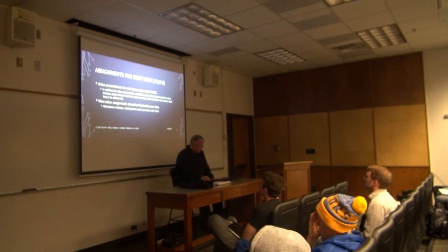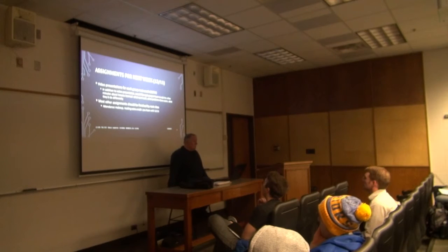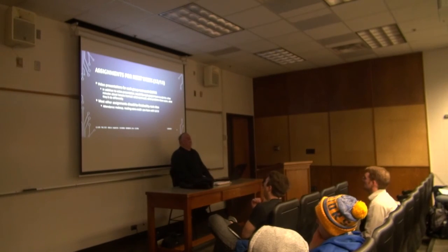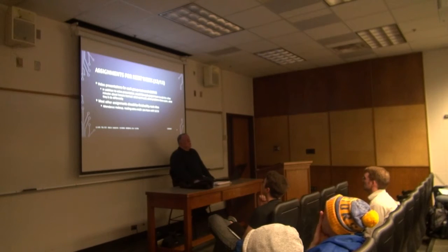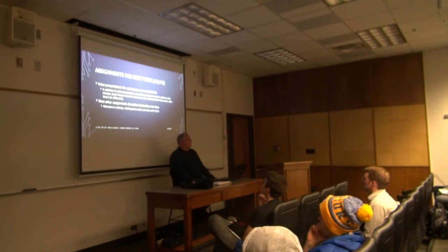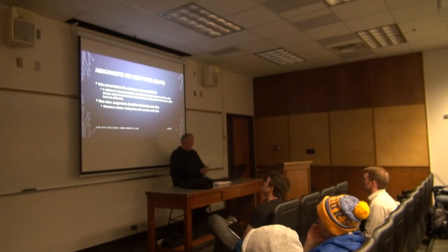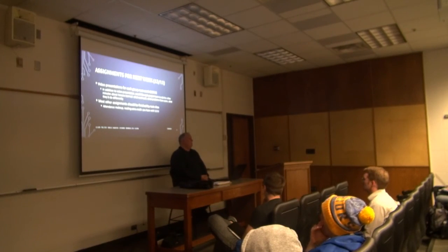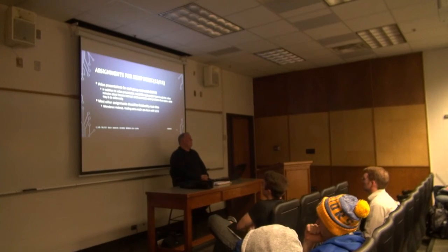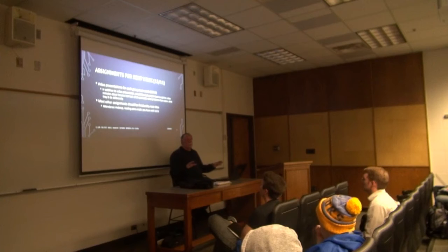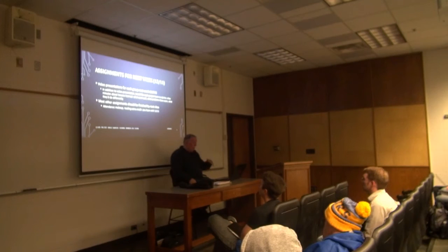Okay, we're almost done with the class, folks. Video presentations next week. Along with your video presentation, I'd like each of you to share what your lessons learned were, probably after, so we don't all lose interest. Just brief: here's how we started out, this is what went well, this is what didn't go according to plan, and here's what we'd do differently. That's what I'm very interested in hearing, what you'd do differently knowing what you know now, because that's the most valuable information you can gain doing software projects.